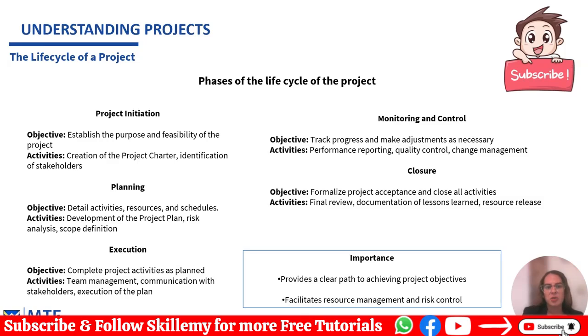The fourth phase is monitoring and control. While the project is being executed, we also need to keep an eye on its progress, which happens in the monitoring and control phase. The main objective here is to ensure that the project is moving according to plan and make adjustments if necessary. Activities in this phase include performance reporting to track whether we are meeting our goals, quality control to ensure the project's deliverables meet the expected standards, and change management to handle any modifications to the plan. Monitoring helps us identify potential issues early so we can take corrective actions and keep the project on track as planned.